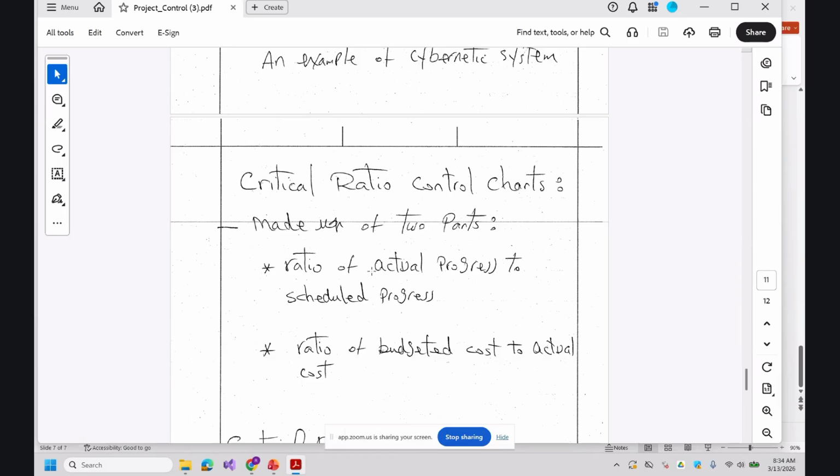Or you planned to finish it in 15 days, but your teammate came up and told you, no, I finished that work in 2 days. Then you're going to kind of doubt. How come we estimated 15 days? Now you're telling me that you finished it in 2 days? Not that it cannot be true, but this raises a flag that you need to check, whether that is really the truth.